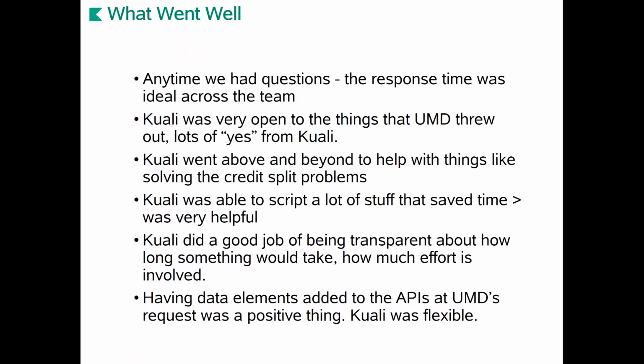Kuali went well above and beyond on our credit split problem, and I'm going to have Susan talk about that in just a minute. There were certain things in the credit split that we didn't discover as a bug, so our data migrated with the dirty data. Now we were having to clean up the dirty credit split problem in Kuali, since we didn't clean up that dirty data in COEUS before migration. Kuali was able to script a lot of stuff for us.